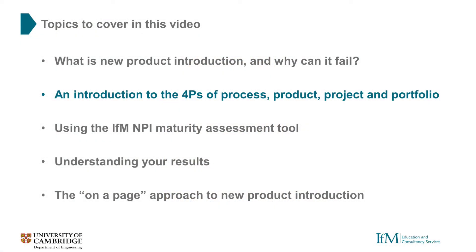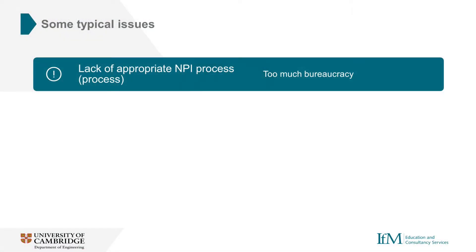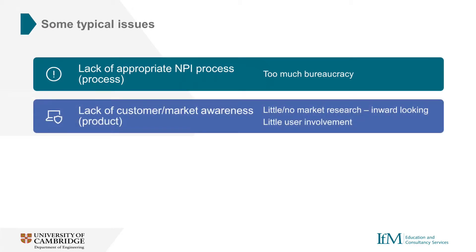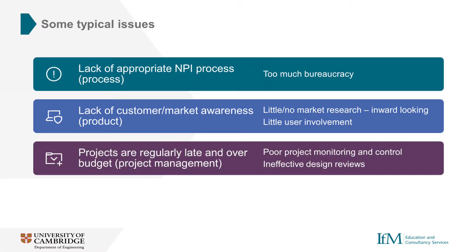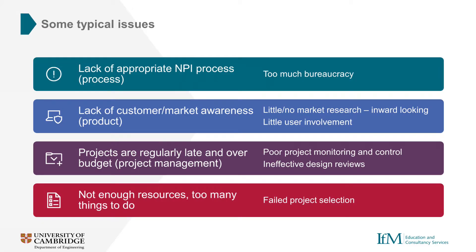A good way to avoid these issues and get your NPI process in order is to consider the four P's of process, product, project and portfolio. Research by Dr. James Moultrie at the IFM suggests that many new product introduction problems arise due to issues in four key areas: lack of an appropriate NPI process, for example too much bureaucracy; lack of customer or market awareness, perhaps because of too little market research or user involvement; projects that are regularly late and over budget due to poor project monitoring and control or ineffective design reviews; or not enough resources or too many things to do because of failed project selection. What we should be aiming for is a strategically prioritised portfolio containing multiple on-spec, on-time and on-budget projects, which follow a managed and fit-for-purpose NPI process and deliver products which the market really wants.